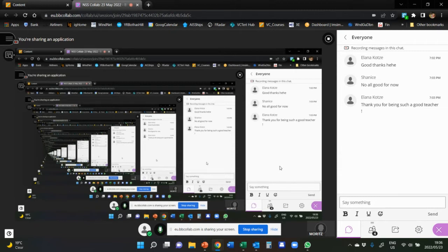It might involve consulting with the staff. And what's involved in that? You need to set dates, choose a venue, or use an online survey system like SurveyMonkey to get feedback from the staff. In other words, what particular tasks are you going to do? You'd have to book a venue, invite the relevant staff to the workshop, hold the workshop, write the minutes of the workshop, and compile that into a finalized spec sheet. You see what I mean by unpacking some of the activities.